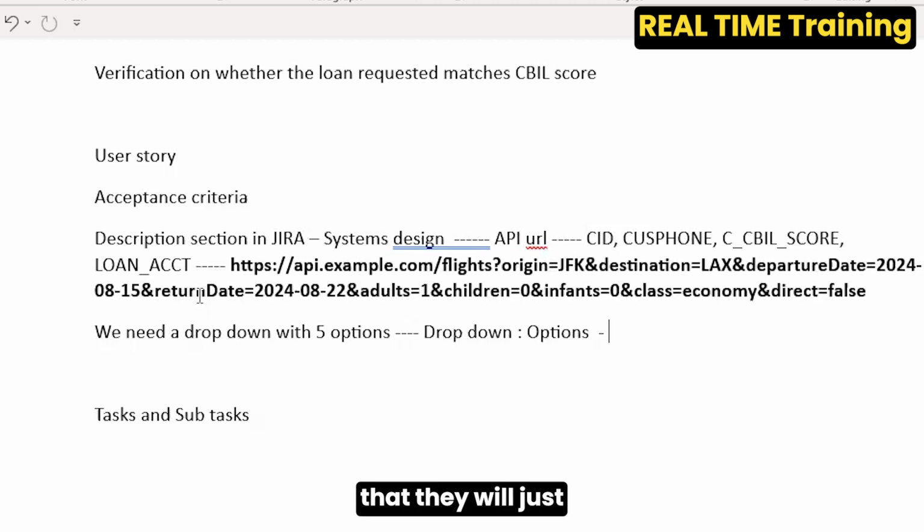Sometimes developers slack. They will give an 8 story point as 13, and they'll say we'll finish it in 2 sprints. They will lie like that, developers. Then, if you're working as a Scrum Master, you have to say no, let's break the story down.